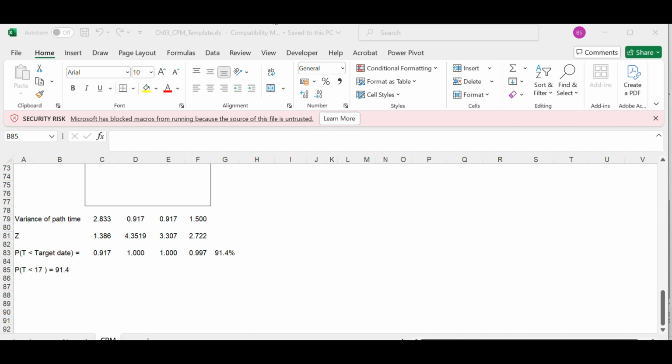Cash flow talks about timing and synchronizing inflows and outflows. Budget talks about what you need and what is the cost involved for what you need. When you overrun the cost, impact is on cost, time, and resources. There are four types of cost estimate in a project: the order of magnitude, ballpark estimate, preliminary cost estimate, and a definitive cost estimate. These four types of cost estimates differ in six aspects.